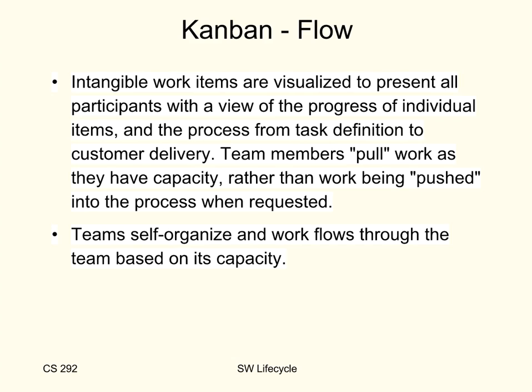Okay. And so then flow. Intangible work items are visualized to present all participants with a view of the progress of individual items and the process from task definition to customer delivery. Team members pull work as they have capacity, rather than work being pushed into the process when requested.